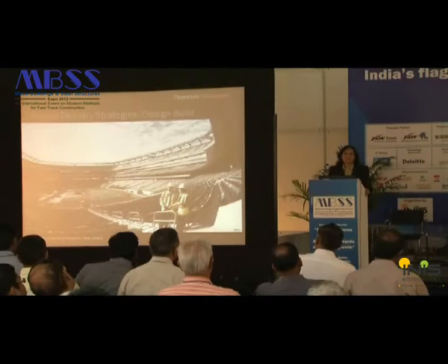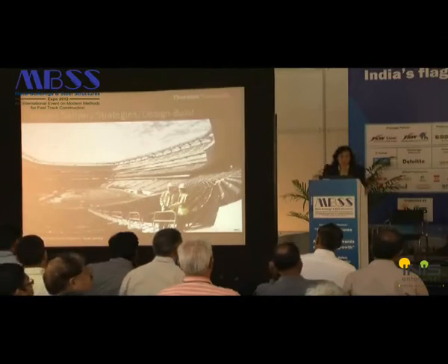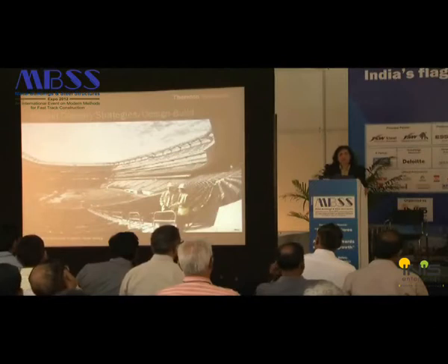We designed about 8,000 tons of steel in 2 weeks, talking to the architects without really getting drawings, making some good assumptions, and we placed an order. If we had not placed that order, the next schedule would have been after 8 months. So the job would not have been built, or we would have had to look for all the fabricated sections, and that would have taken a lot more time.